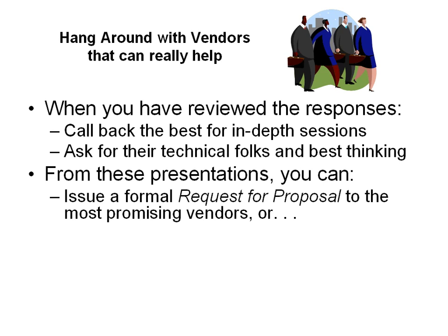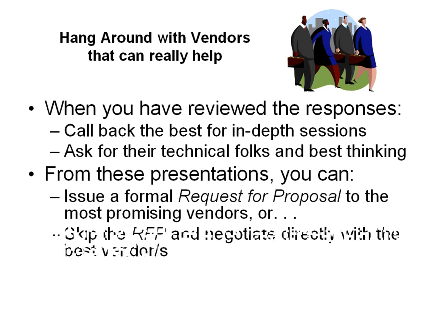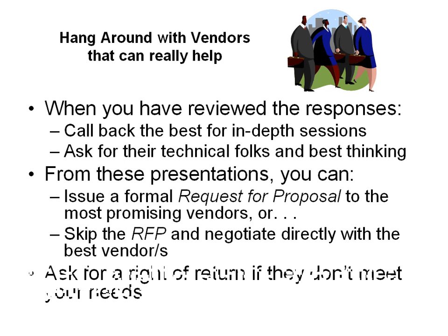From these presentations, you can do one of a few things. For instance, if you're federal government, you may have to issue a formal request for a proposal, and it may have to be competitive. But at this point, you know how to structure that so that you're not going to go back to ground zero. You may, and we've seen this happen, know enough from these vendor sessions that you can negotiate directly with the best vendors and skip any kind of request for proposal, because you get enough data. You say, give me a price because I think you're who I want to deal with.